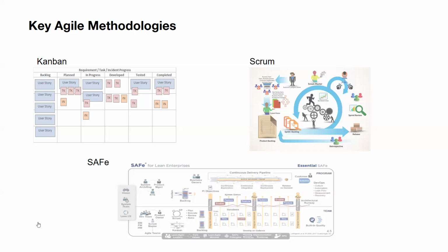What we are saying is at the moment it's not possible for us to accommodate this one during this sprint, but we will take it in the next sprint, right? Put it into our backlog and we will take it in the next sprint and we will deliver it. So the maximum amount of time that the client will lose is one sprint, right? Or 2 weeks or 4 weeks, depending on the timeline, right? So if the client agrees, fine. If not, then the product owners and relevant parties have to discuss and figure it out, right?